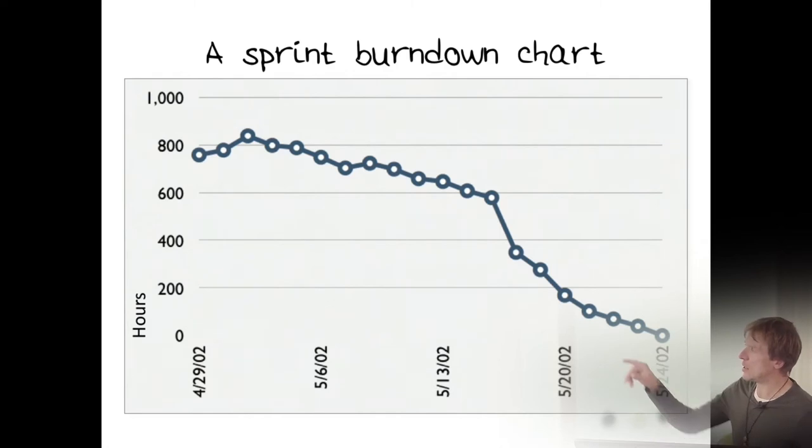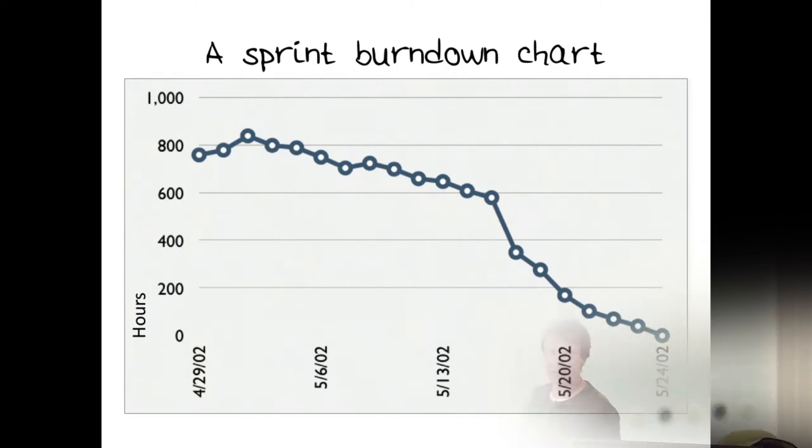Don't really know. But as you can probably tell by looking at this, if you are up here at this stage a few days before you end, there's no way you're going to finish. Right? So you use this to manage yourself. And the product manager, product owner, is also looking at this to see, maybe we need to drop something. Because you get zero credit for almost finishing all the stories. Zero. Nothing. The only thing that counts is working functionality. So accepted, a user story that's been accepted when it's been presented to the product owner.